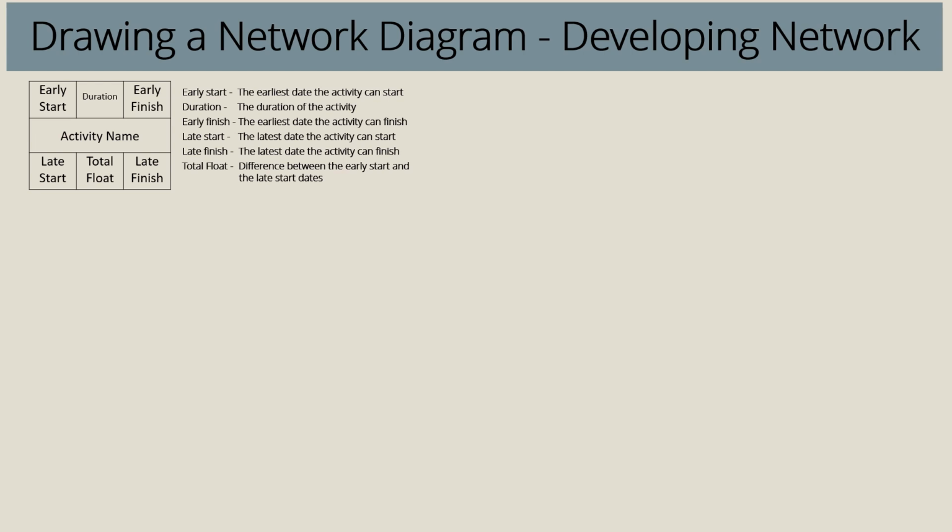The following steps are involved in creating a network diagram. First, identify activities and dependencies. The second step is determining a starting point. The third step is inserting activities on the future nodes of your diagram. The fourth step is connecting the activities with arrows that represent the type of logical relationships.